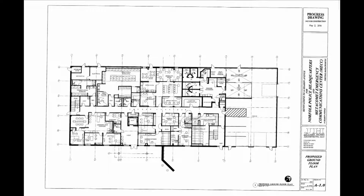These drawings now are final. We're getting the final bid specs out, we hope, by the end of October. With a little bit of luck, a 30-day bidding process and then an awarding process, and I would guesstimate that we should be starting construction around the first of the year, I hope. Yeah, well, I think we'll negotiate and award the contract right at the beginning of the year, and then as soon as the general contractor starts after that, you're right, it'll be soon after January 1st.